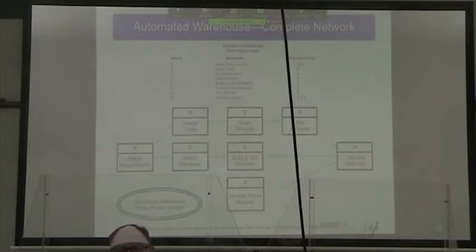Here we have the actual network where it goes from define requirements through assigning the team and designing the hardware, which can be done at the same time, and then coding the software, building and testing the hardware, developing the patent requests, which can all 3 be done in parallel, through testing the software and integrating all of those systems together.